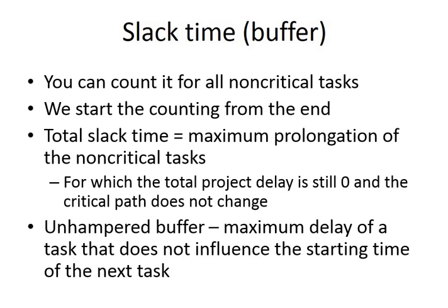And also we can speak about the unhampered buffer, which is the maximum delay of a task that does not influence the starting time of the next task, because sometimes there are also delays between the tasks. Things like that may also appear. So there can be some time buffers inside your project, and sometimes you even need to plan them, let's say to be safe, to have this buffer on your side.